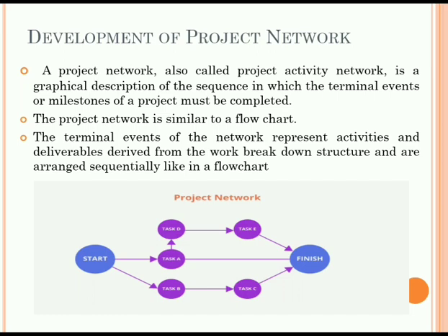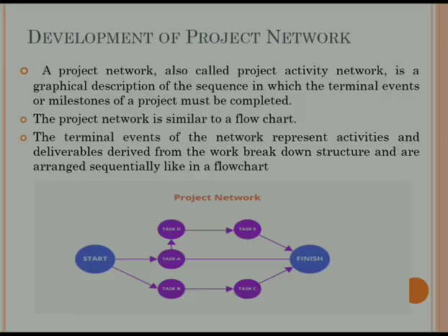The diagram may also contain dummy tasks that are used to show the interdependencies between the different tasks. Dummy tasks, though, do not represent any real sequence of activities, but they are more like checkpoints or milestones that may need to be completed on the way to moving forward with the next task.